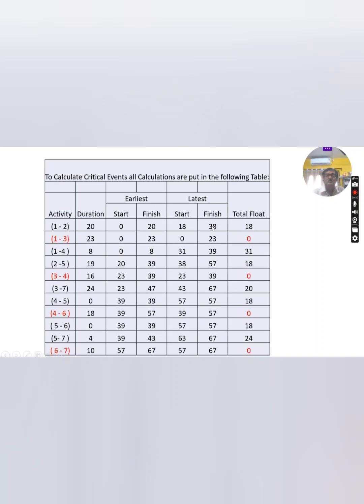So 38 minus 0, the earliest start time, minus 20 gives 18. See for this case, the latest finish time is 23 minus the earliest start time 0 minus 23, that's why it is 0. I am showing this quickly just to save time. You can check, and if you have any doubt, please mention it in the comment box and I will definitely reply at the earliest possible. This is the latest finish time 57 minus the earliest start time 39.